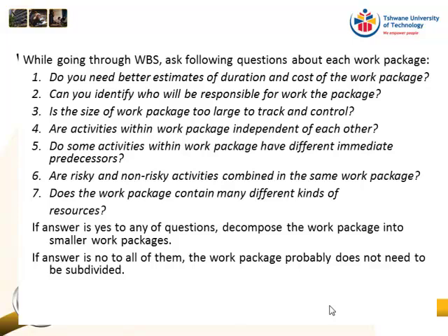We don't want to do that. We want to separate risky and non-risky so that we can focus on the things that are risky and we can put plans in place for whatever is risky. Does the work package contain many different kinds of resources? So if we have a work package and it needs a civil, mechanical, electrical and electronic engineer to do it, it's probably not broken down far enough. If the answer is yes to any of the questions, decompose the work package into smaller work packages.